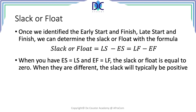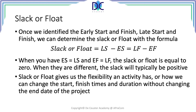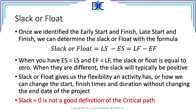It is possible in some cases to have a negative slack, but that is too complex for what we are studying at this moment — we will talk about that later. The slack or float gives us the flexibility an activity has: we can change the start, finish times, and duration without changing the end date of the project, as long as we use the slack or float. Sometimes people define the critical path as activities with slack equal to zero, but that is not a good definition of the critical path.